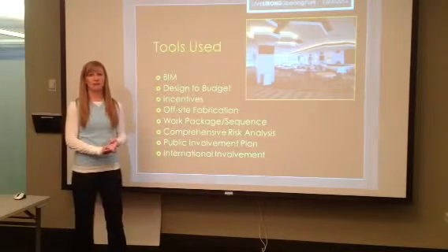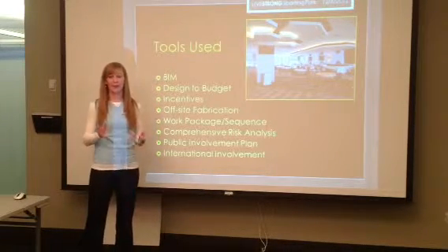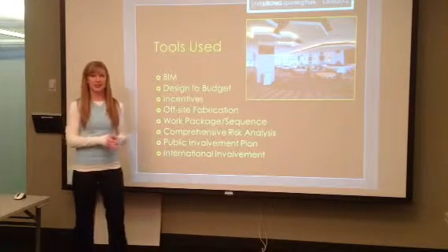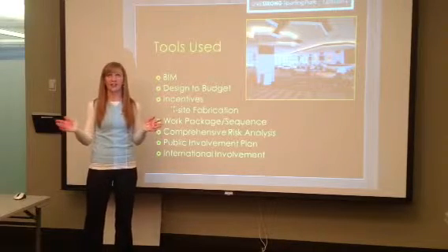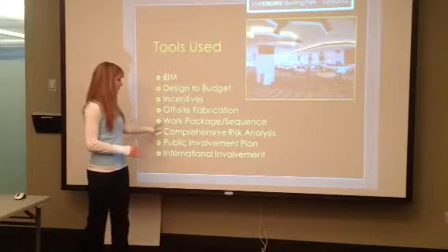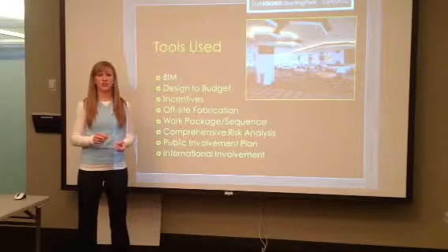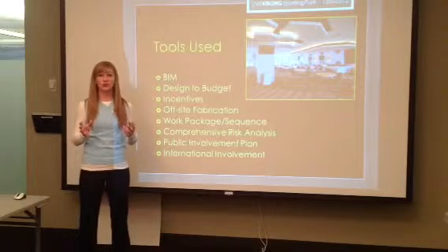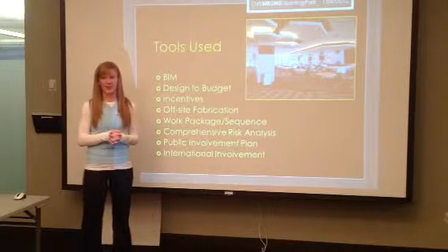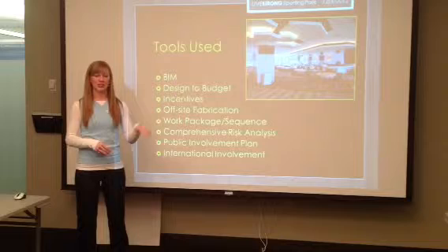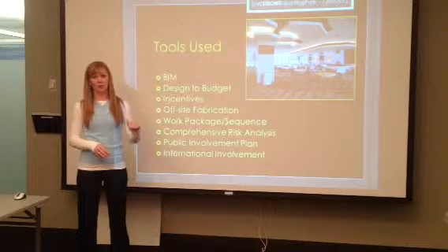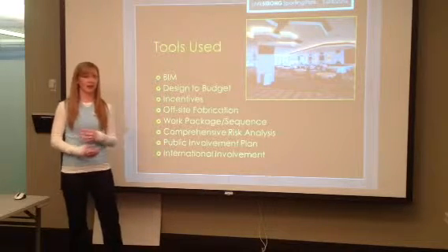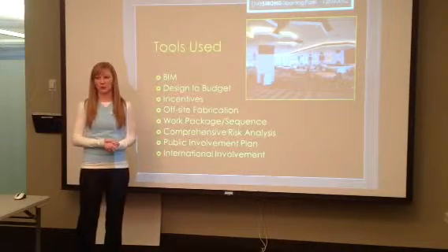We did some off-site fabrication when it came to plumbing pipe and things like urinals and water closets. We also bid the work in sequence, correlated with the schedule. One thing that's big with this part is we also awarded two different drywall subcontractors and masonry subcontractors the work due to the quick nature of this stadium. One sub took from the concourse below and one sub took from the concourse above. That really helped with our manpower and making sure we were on time and on schedule.